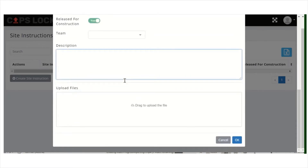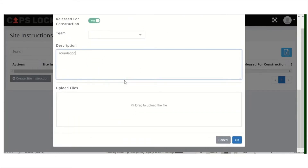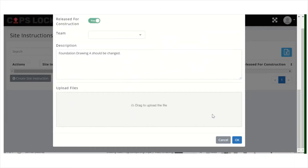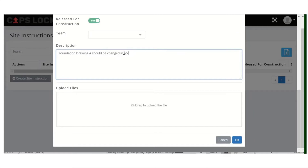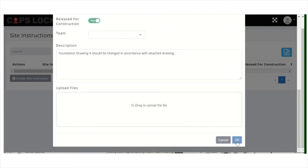You can give here a detailed description about the instruction — for example: Foundation Drawing A should be changed. You can upload a drawing and write, for example, in accordance with attached drawing, and upload the file there.